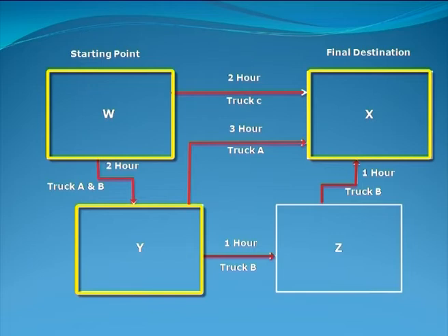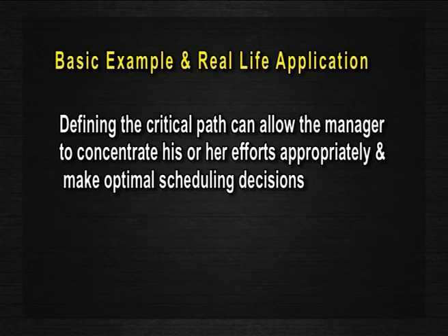Anything delaying that truck will delay the project, while all delays experienced by the other two trucks would not be significant unless they push the project beyond 5 hours. Defining the critical path can allow the manager to concentrate his or her efforts appropriately and make optimal scheduling decisions.